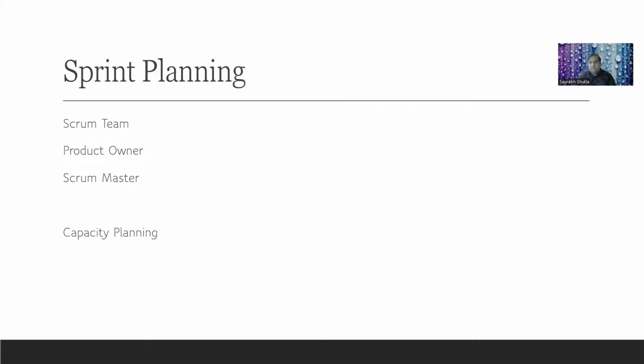But we have to improve day by day. That is our objective and key results, which we have to follow very objectively. Otherwise, if you take 200 story points in a particular sprint and you are not able to deliver that, your velocity will suffer. It shows that you are not able to deliver what you have taken into your account. So see, this capacity planning is very important: how many hours you have, and according to that, take only that much work. A sprint is only 2 weeks. In that 2 weeks' time, take only what you can deliver.